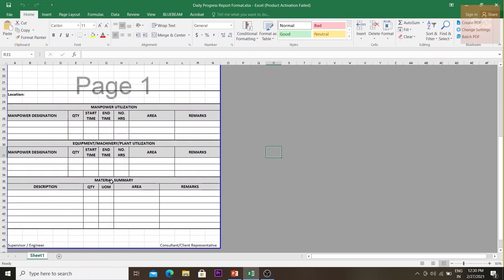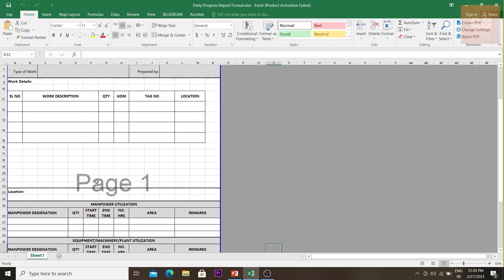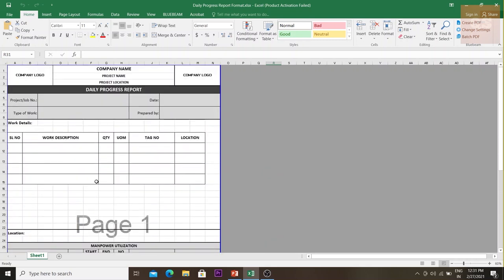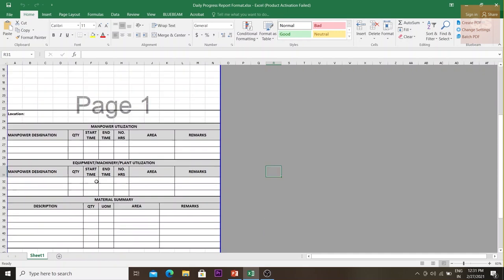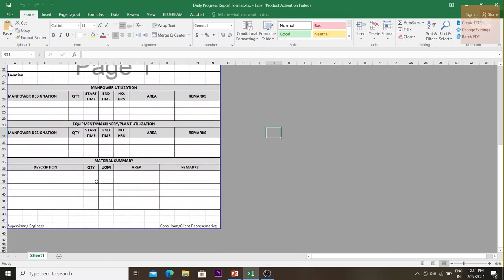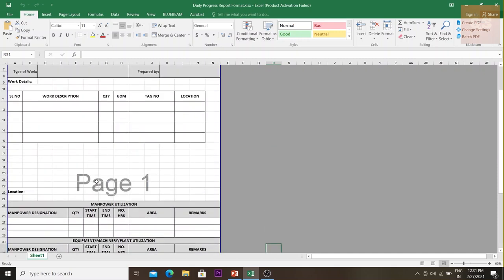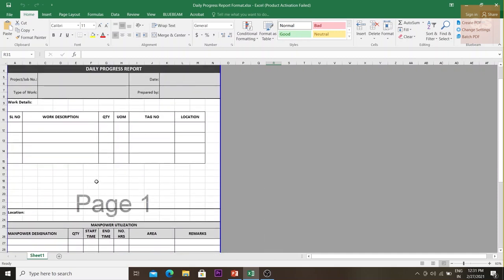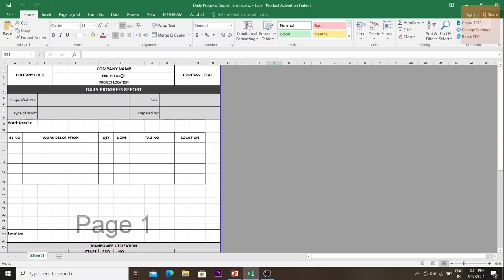The template also captures manpower utilization, equipment and machinery plant utilization, and materials used. With this sheet, when I received the daily DPRs, I would record the works of each day. I used to spend some time recording all the DPRs from the different teams, and at the end of the month I would get the cumulative amount of work done to mark up drawings and submit the payment application.